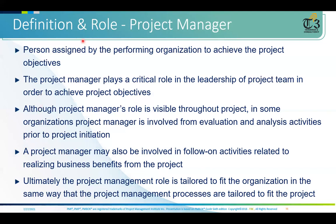So who is the project manager? The person assigned by the performing organization to achieve the project objectives. And what are the project objectives? Stakeholder needs and expectations. To achieve project objectives, 90 percent of the project manager's time should be spent in communications to engage with stakeholders.